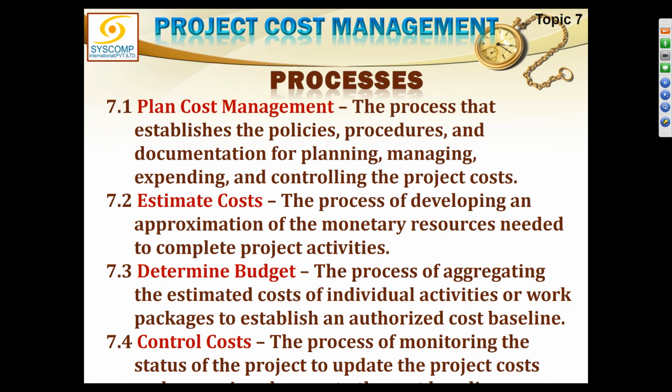May it be a lump sum estimate, may it be a little more detailed estimate. A little more detailed estimate is called a budgetary estimate. So you may go for a budgetary estimate, and you are fairly clear how much the house will cost, and say your estimate is about 5 million, maybe 4.75 million, right? Now you know that this is the cost you have to pay if you do it yourself.